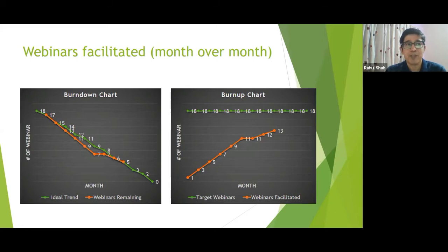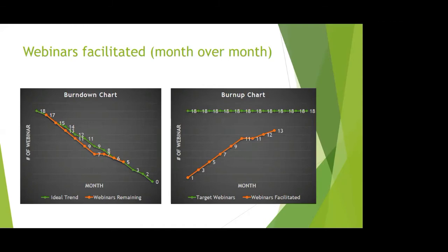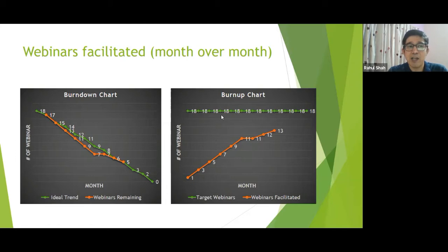anything. Something like if I have decided to read some books over a period of 1 month, I have to read around 250 pages in 1 month, or 500 pages. I will create an ideal line and can track progress against that. Then I will come to know whether I am on track or not, and when this will be done.